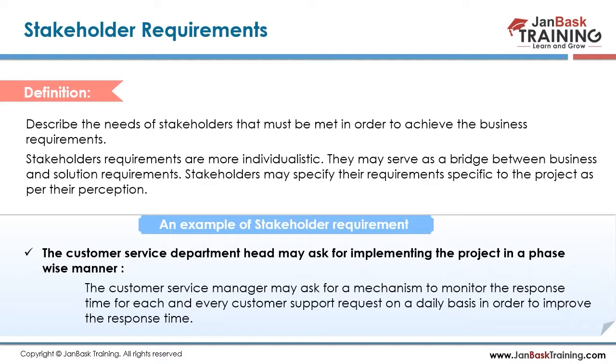So suggestions should even keep coming in parallel from the BA to the client. This is how we need to move forward. This is how we can think of going ahead. This is what we can demo to you guys. In this short span of one sprint, we can get this done. If you want the complete product list, it's probably going to take another 6 sprints or 2 releases.